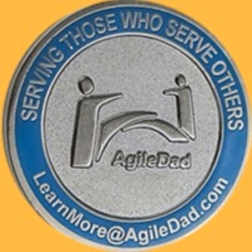Now, while we know it's ideal for a team to be dedicated to a product and dedicated with a Scrum Master and have a dedicated product owner, that's great and in most cases would work best. However, most organizations aren't aligned in a way that they can do that. So what we find is that most organizations have multiple product backlogs, one for each product, so that they can maintain it at that level. They'll structure a release backlog of the things that they hope to be included in a release of either a suite of products or an individual product.